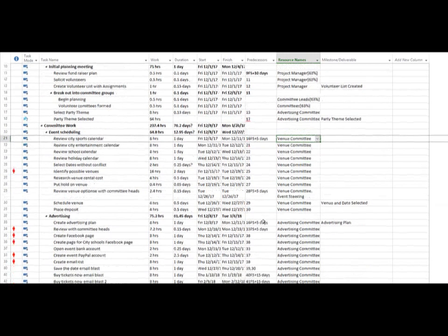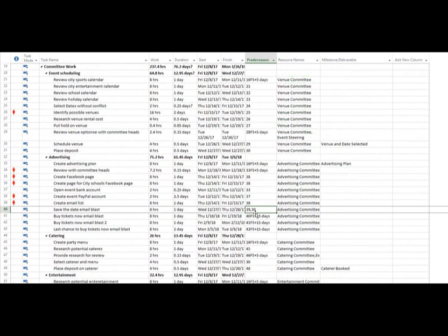Okay? Notice something else down here. Here I've got 2 tasks as predecessors. So for advertising, before I can save the date and send out an email blast on save the date, I have to first create my email list, and I also have to schedule my venue. I can't say save the date until I know where I'm going to be holding my party and when I'm going to be hosting that party. So I have 2 tasks as predecessors here.